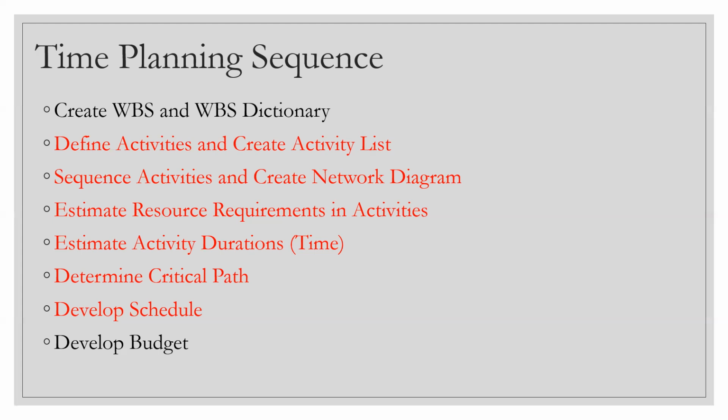Okay. Now, once you are going through the network diagram, it's very simple to know that if one activity takes, let's say, 10 hours, then how many resources or man hours I need there. Probably one guy can do it in 7 days, or two guys can do it in 3 days, and so on, right? It depends on how fast you want to do it. So probably you want to plug in two guys there, or maybe one guy for 10 days. So basically, you are estimating the requirements of the resource once you draw the network diagram.